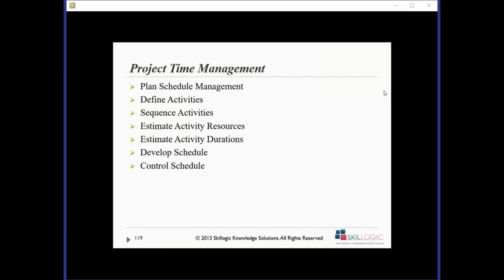All this information, the thresholds, the unit of measure, the tools and techniques, is mentioned in my plan document, right? Even the power of the project manager. What is the power of the project manager? If the change is of less than 2 days, 5 days, the project manager has a right to approve it, right? So all those things are mentioned in my plan document.